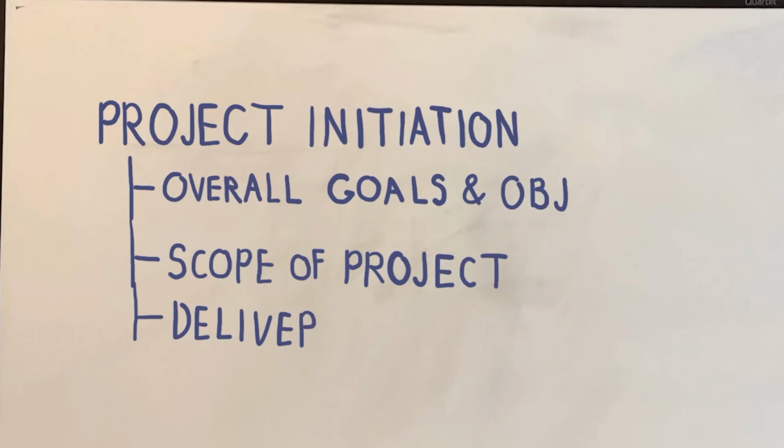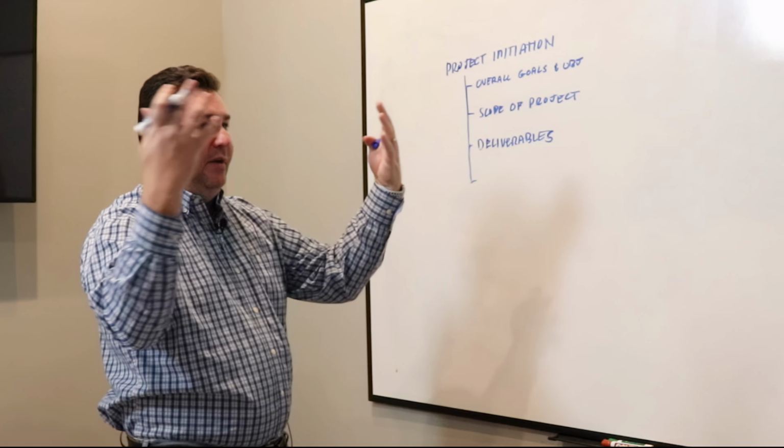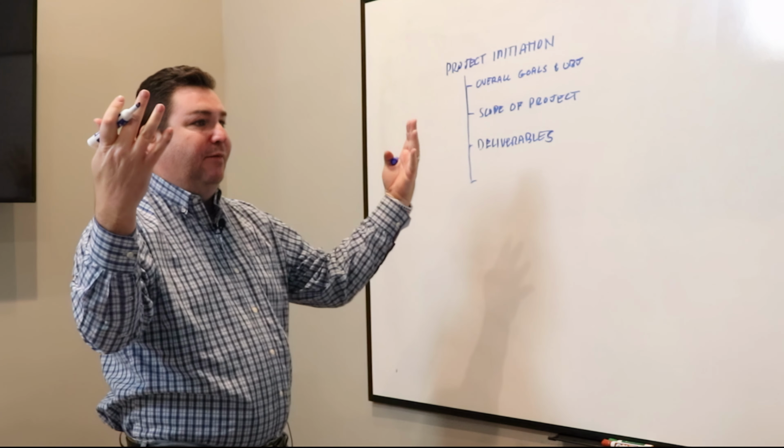One of the other items that we're going to include is deliverables. Sometimes these can be considered outcomes. Say I'm merging two enterprise networks into one. My deliverable will be a single functional network that was previously two separate or segregated networks. But you're describing it well enough that it's going to summarize the outcome. Is a deliverable something that's tangible, something that you have in your hand, a finished product? I would say typically not tangible. The deliverable may use the term a document. It is the concept in general. It's the complete and thorough management of all of these assets.